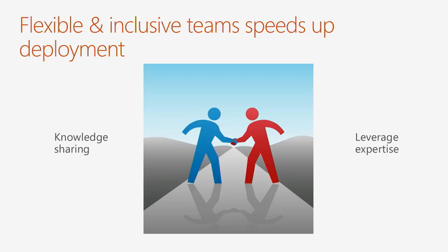It's seamless knowledge sharing, because as soon as we started migrating users, our service desk people were with us in the room, so as soon as we had any issues, they were there working with us. We didn't have that waterfall scenario of project team does all the work, works it all out, and then hands over to the service desk in a training some months later. It was absolutely seamless. And they could then do any documentation that they needed and pass on the information that they needed during their heartbeats. So a really effective strategy.